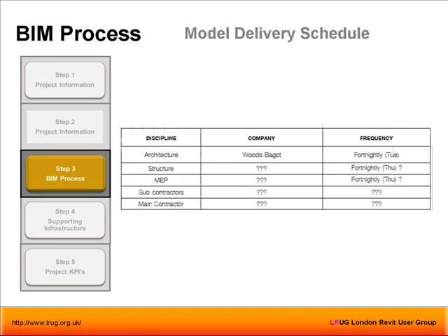Next one. Okay, once you define LOD metrics, then you define responsibility metrics. Who is going to model what? Obvious one, but there are certain gray areas, like who models structural walls, and do we both have structural walls? Who owns the door, and who holds the door and the structural wall and stuff like that. So it's a key one. Responsibility metric is absolutely key in this process.